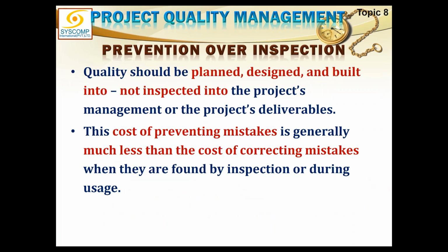Then we learned from this that prevention is better than cure. Prevention is better than inspection. So a renewed emphasis on quality assurance rather than on quality control. Previously people used to think that we just have some inspection team which will ensure that no mistakes go out of the factory floor. That would be the quality. So they were just inspecting the system. They were not taking any measures. Now quality means that quality has to be planned into the system, designed into the system, built into the system, and inspection is not sufficient.